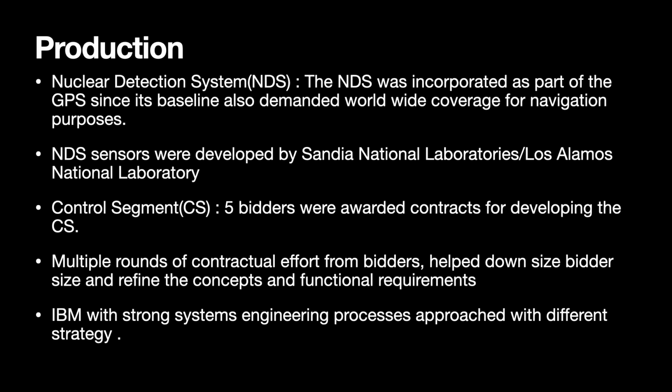Multiple rounds of these contractual efforts not only helped size down the bidder pool but helped further develop and refine the concepts and functional requirements, resulting in a pre-SDR functional baseline stage. IBM was the final winner of the contract. Although IBM did not have previous experience working in space-related projects, it had pretty strong systems engineering processes. IBM approached the production with parallel paths.